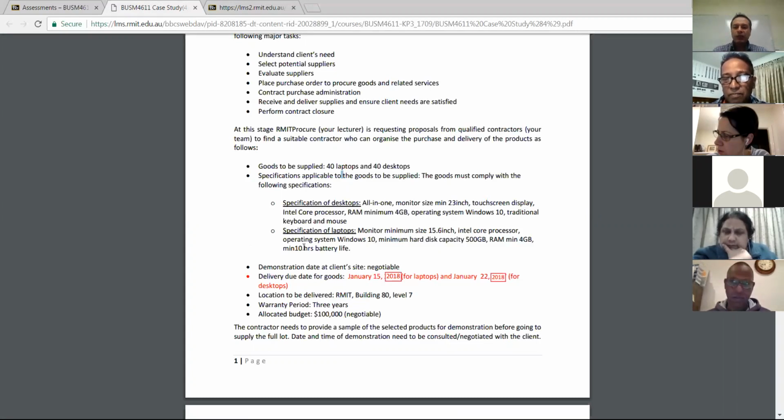Once you have delivered, you will need to go for some other activities to finish the project formally. So make sure that you consider those activities and you formally close the project. Also, you will need to have your payments and these things, and also prepare some documentation for finalization of the project. So the delivery date won't be the finish date of the project.